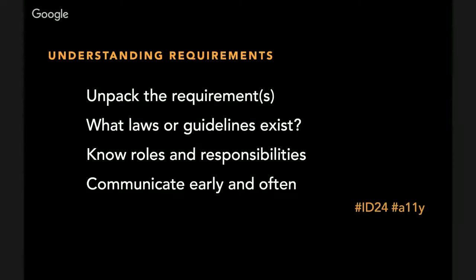There's a great resource out there for the roles and responsibilities. I think it's the WCAG 2 Quick Reference Guide from the W3C that really lets you slice and dice those requirements by role or by content type, and it can give project managers a head start in understanding how to address accessibility at different stages in the project.